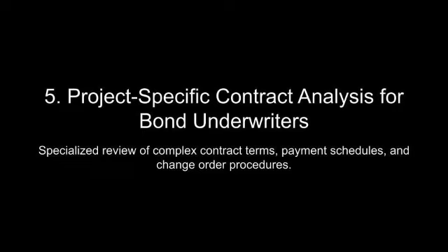Poorly defined scope expansions, in particular, can lead to disputes over cost increases, timeline adjustments, and quality expectations. For instance, a change order requiring the addition of a new structural component may disrupt the contractor's workflow, delay project completion, and create additional costs that strain the contractor's financial resources. These challenges are further compounded when the scope expansion is not clearly documented or agreed upon by all parties, creating ambiguities that can escalate into legal disputes.